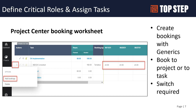This is something that I think will continue to grow and get more scalable and powerful. I use this today for my projects — as new projects come in, I go to the Project Center and create those generic placeholders based on when the project is expected to start and the effort I think it will take for each resource type, then modify from there as the project moves from proposed to closed. It's a good in-between option without requiring customization or booking approvals.